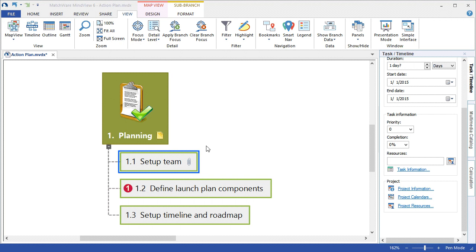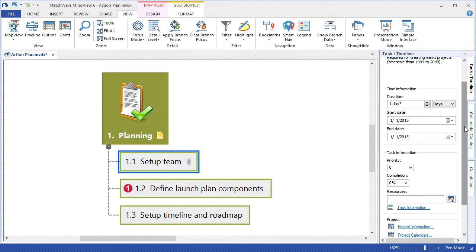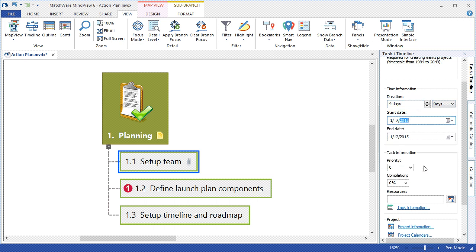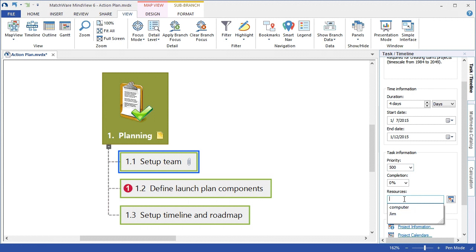Now that we've added the Project Information, Project Resources, and Project Calendar, we can begin scheduling the relevant tasks. I left-click the desired task, choose the duration and metric for that task, associate the start date. The end date is automatically populated based on the duration. I can give that task a priority, like low to high, and associate a resource to that particular task.